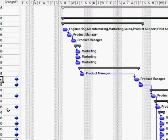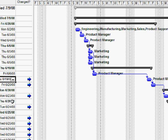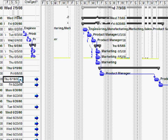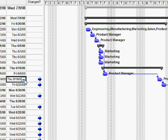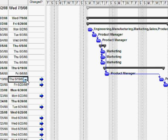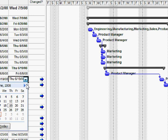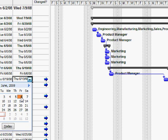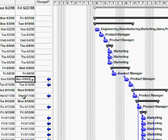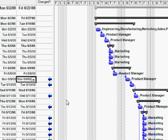Of course, not always is the news bad in one of these meetings. Let's say that in the intervening period, instead of slipping out, we'd brought the task forward to the sixth. Note that on this occasion, the indicators go off to the left instead of to the right. So a quick way here to determine what has changed since the last interim plan was set. What I would suggest is after each weekly team meeting and the changes have been agreed, a new interim plan is set.